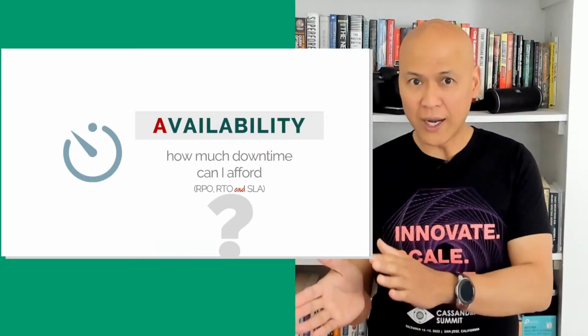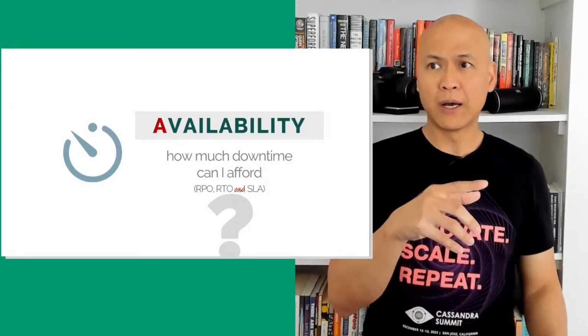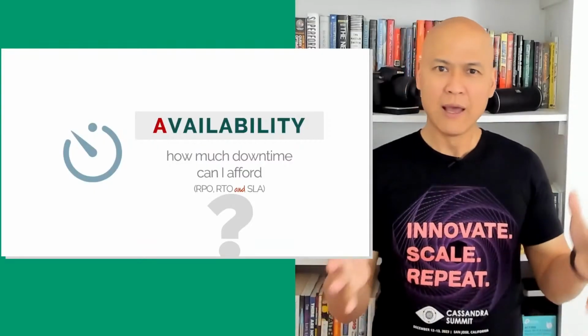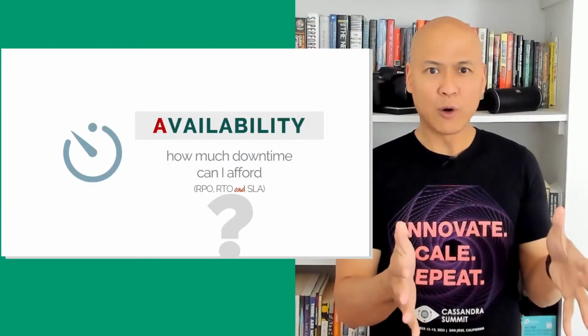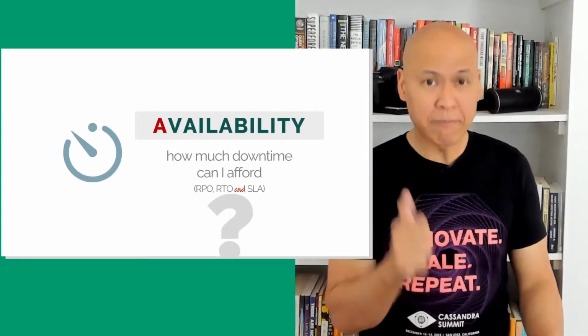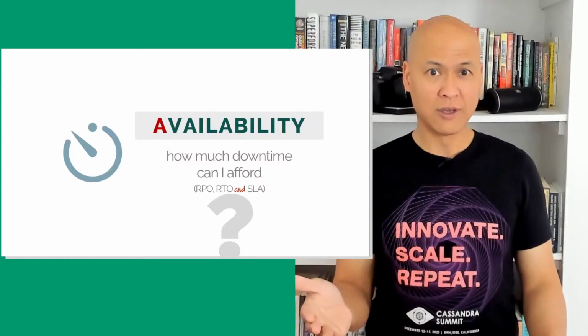It's also why in the operation and upgrade and migration project timeline, I spend a lot of time on phase number one, which is the preparation phase, because I want to measure the amount of time it takes for me to cut over from the old production to the new production.